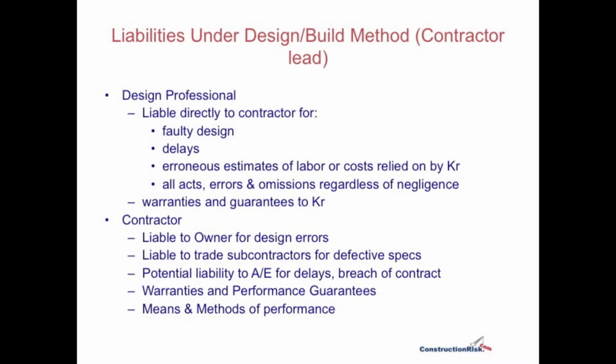The contractor has liability when it has the lead role. Its liability is going to be to the owner for the design error. So here, even though it's not directly writing the design, the plans and specs, its subcontractor, the designer, is, so the contractor has the liability to the owner for the defective designs.